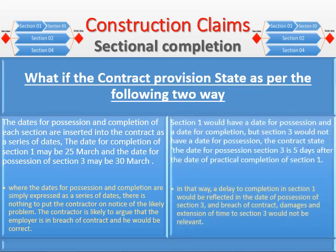In the second case, the contract provisions state that section one would have a date for possession and a date for completion, but section three would not have a fixed date for possession. Instead, the contract states that the date for possession of section three is five days after the date of practical completion of section one. In that way, a delay to completion of section one would be reflected in the date of possession of section three, and breach of contract, damages, and extension of time claims relating to section three would not be relevant.